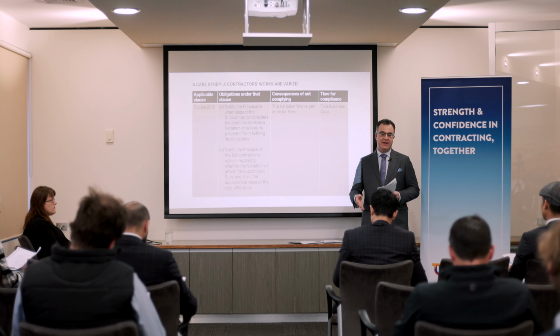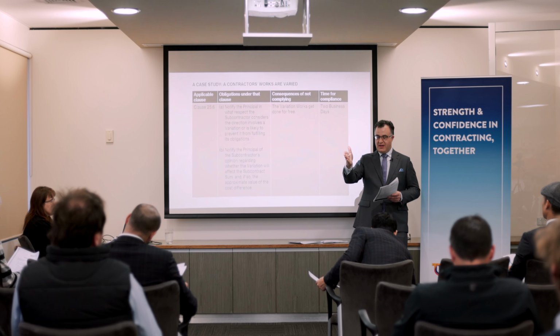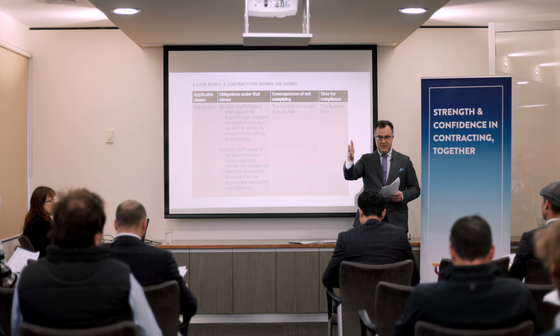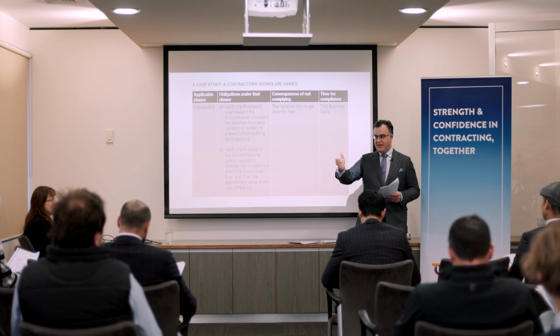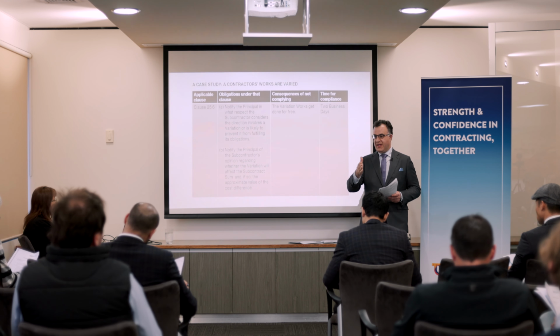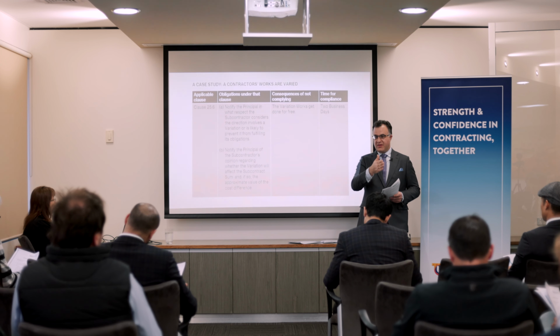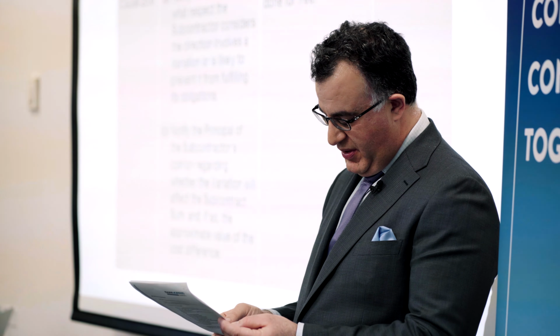So you've got to say where you're at, and you've got to say what the residual impact of the particular qualifying cause of delay that you've notified in the first place is as at the date that is at 5 day, or as at every date that is at 5 day intervals from the initial date of the cause of delay itself when it commenced. And if you've done all that, then the subcontractor shall be entitled to an extension of time as assessed by the principal acting reasonably.